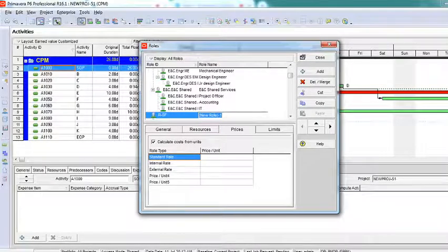But it's not compulsory that every role should have a resource or every resource should have a role. No. I can just say labor is a resource. Labor does not have any roles. I'll just add it directly to an activity. I'll say I need 10 labors on this activity. 10 into 10 means it's a 10 days duration, and I need 10 labors per day. So there are a total of 100 units of labor which we need on that particular activity. You understand? 10 labors per day for 10 days. That is what I can say.